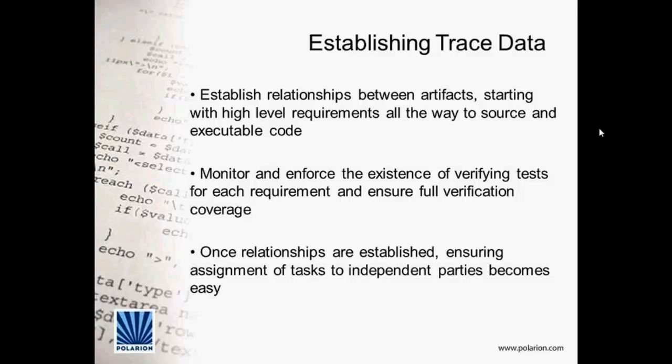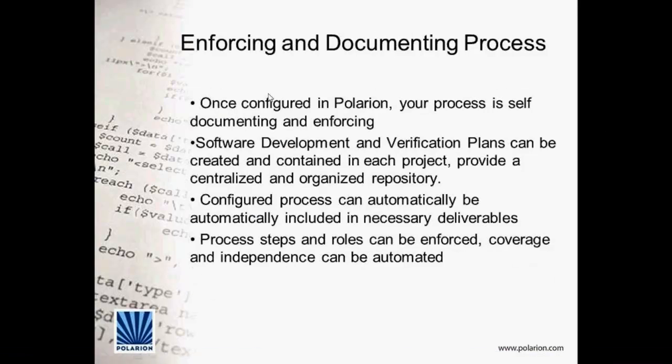throughout your entire project. Once these relationships are established, ensuring that these artifacts aren't assigned to the same people becomes very, very easy. As you'll see in our demonstration, we are able to run reports on the assignment of requirements and test cases to different users, and to make sure that one person is not verifying the same requirement he helped create or implement. Actually enforcing and documenting the process.